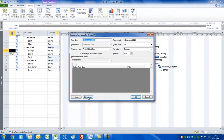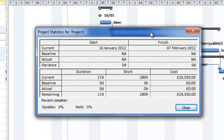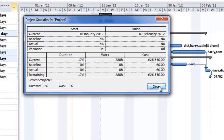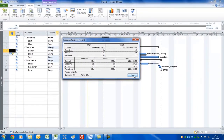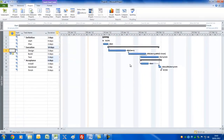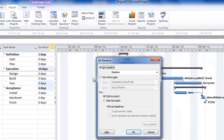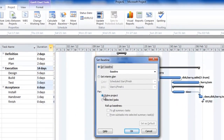Let's look at the big picture by clicking Project > Project Information > Statistics. Here we can see overall dates, work, and cost — information you could show to the project board, sponsor, or senior management. If they're happy with the dates, work, and cost, we can get the plan approved. Click the baseline button, choose to set the baseline for the entire project, and click OK.